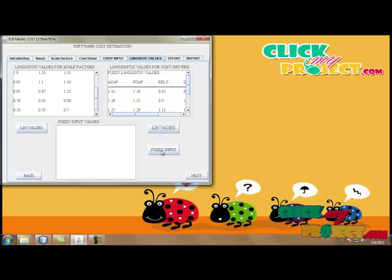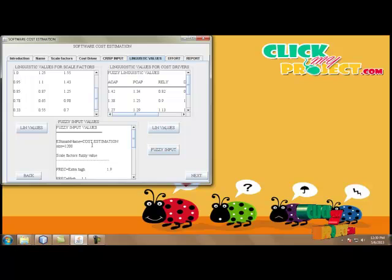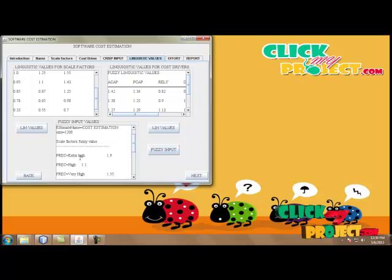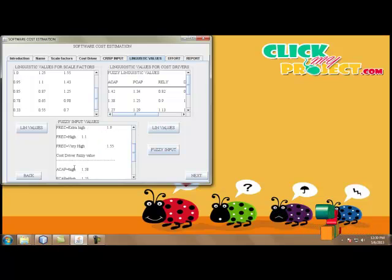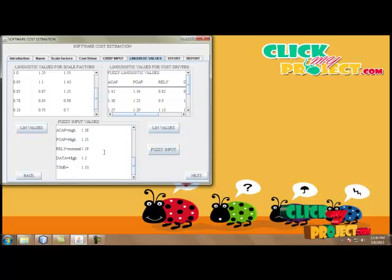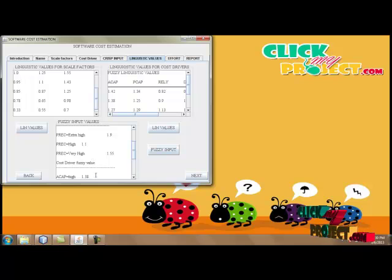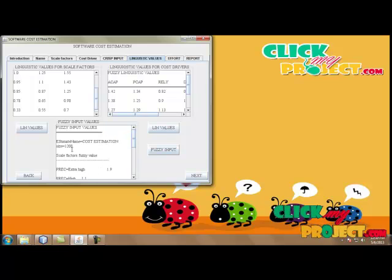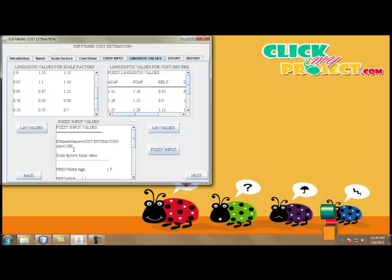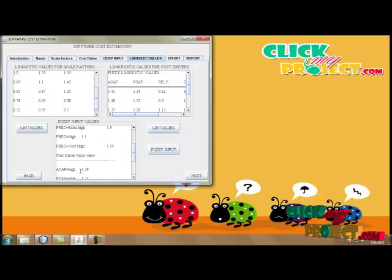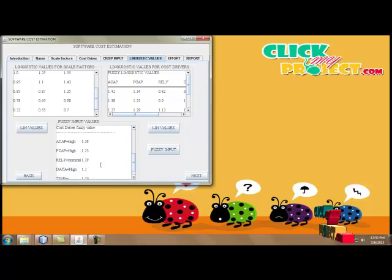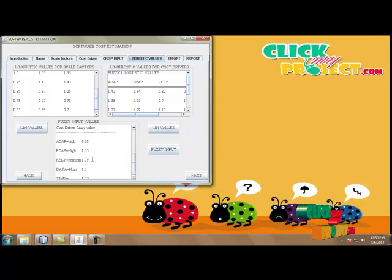By clicking the Fuzzy Input button, the estimation name, size, scale factors fuzzy values, and corresponding fuzzy values for each scale factor and cost driver are selected and displayed. Here is the given input of our process: the estimation name is Cost Estimation, the size is 1200, and for scale factors and cost drivers — the first one, ACAP, is selected as High, so the corresponding percent value is 1.38. These selected input values are displayed and will be used in the effort calculation.